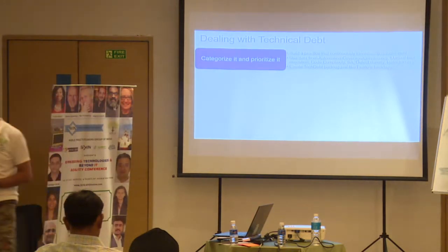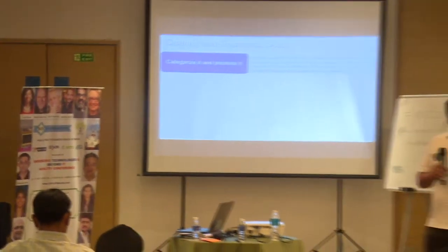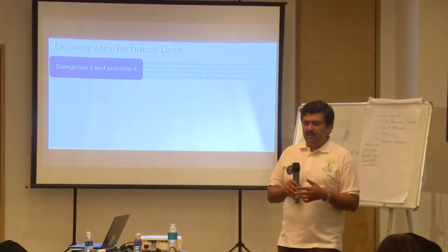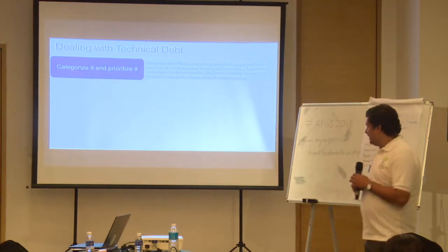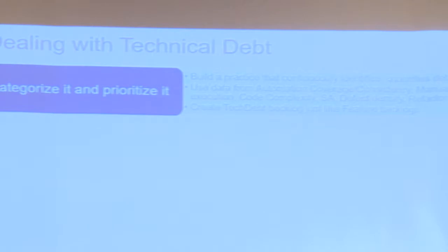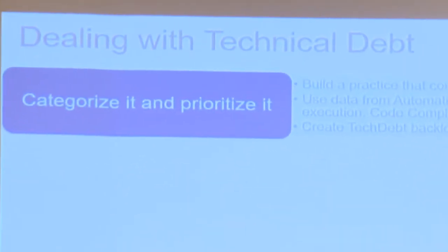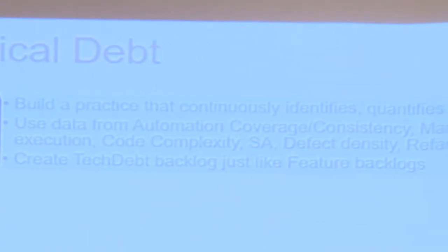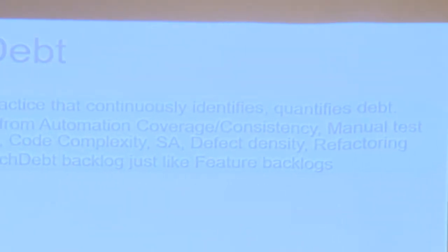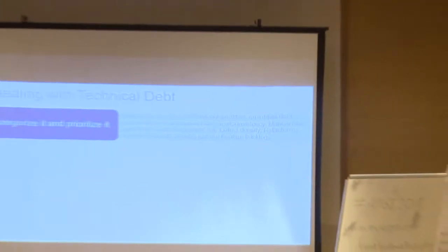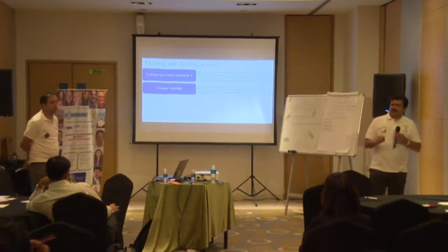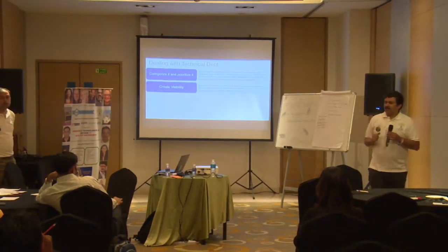So we talked a little bit about tech debt. How do you handle it? How do you manage it? There are different approaches to manage this technical debt. First and foremost is to identify it, categorize it and prioritize it. When you know that you are in trouble, acknowledge it and have an open conversation with the entire team, including the business or the product owner, saying, hey, this is the situation we are in, so we need your help. Let's prioritize, categorize it, and create visibility. This is a big bang thing. That's where we need to make enough hullabaloo about it.